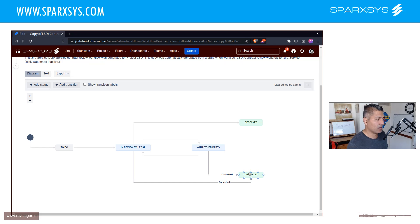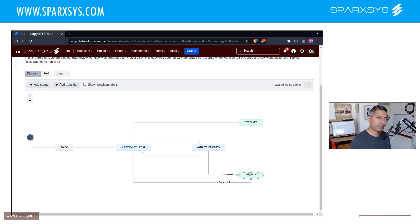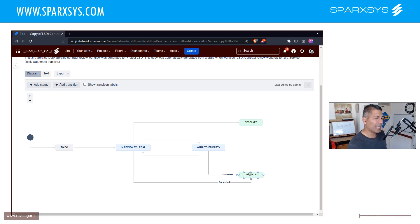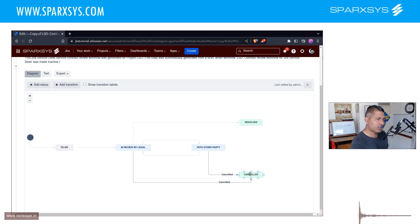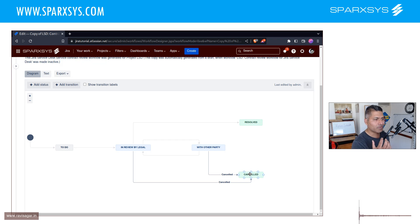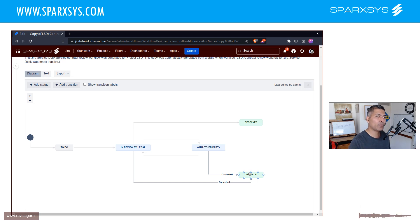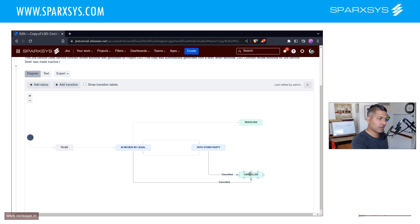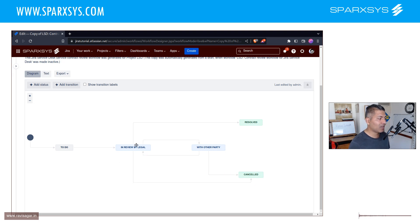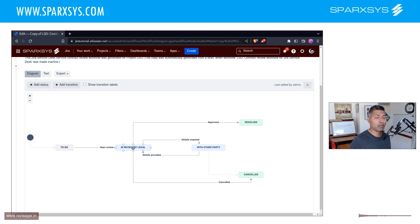So this workflow is something which I believe can be optimized further, or maybe we can make some changes. So basically, what I'm saying here is that, whenever you are naming your statuses, don't really name your statuses that are too specific. For example, IN REVIEW BY LEGAL can easily be IN REVIEW. That is it.